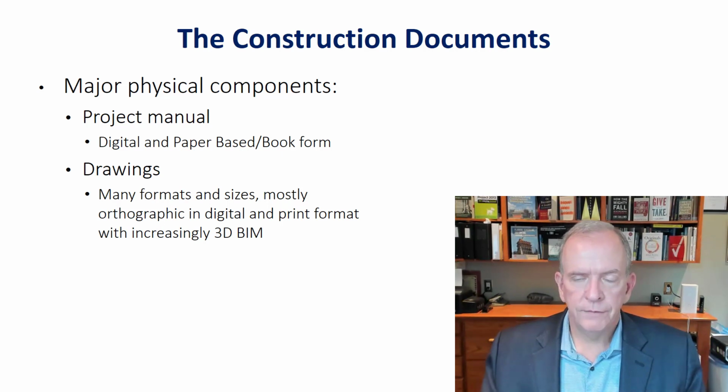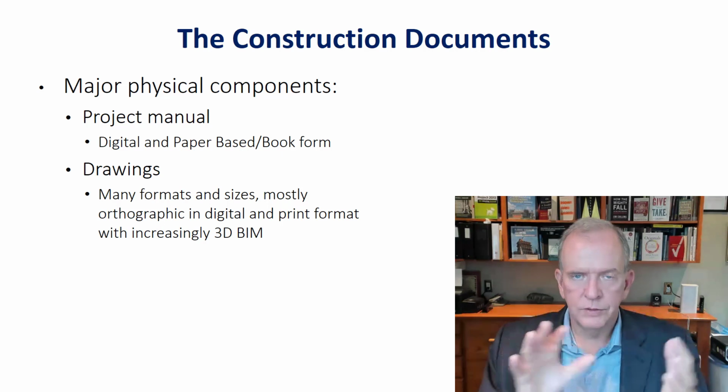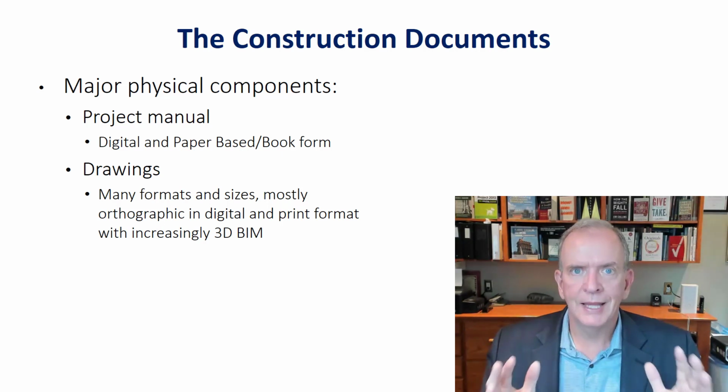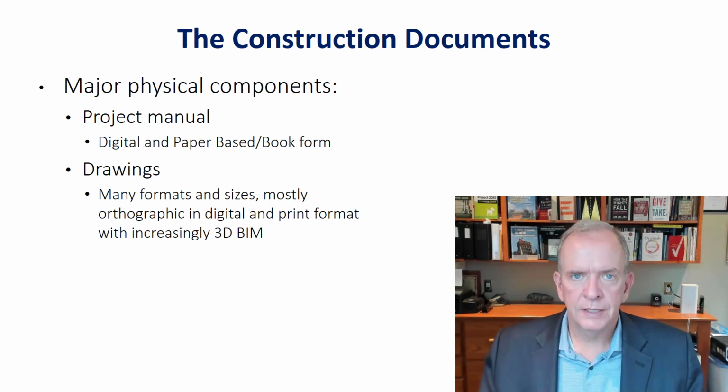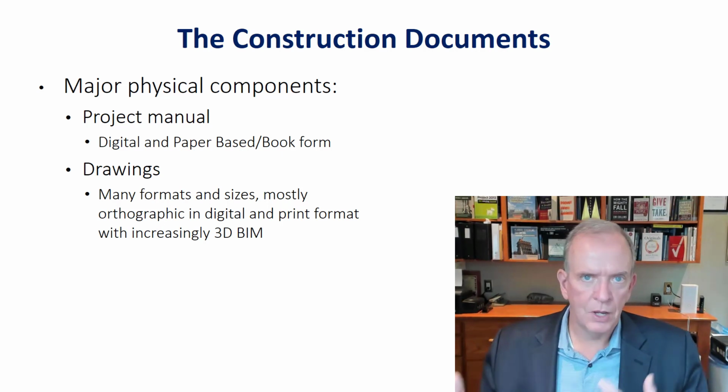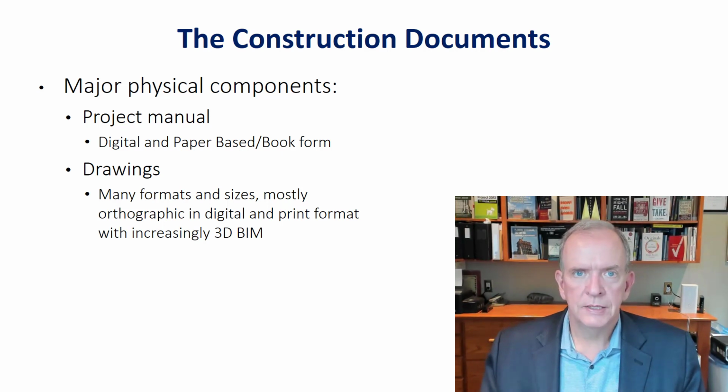And if we get into building information modeling and we get into the highest level of BIM, by the end of a project, there's a whole database of information that's collected on that project, which is a huge aid to a facilities operator. They'll have the as-built drawings, the as-built documents of the project. They'll be able to manage their facilities. They can do maintenance checks, etc. on that. So that's actually the sixth level of BIM, where the contractor turns over the database of information to